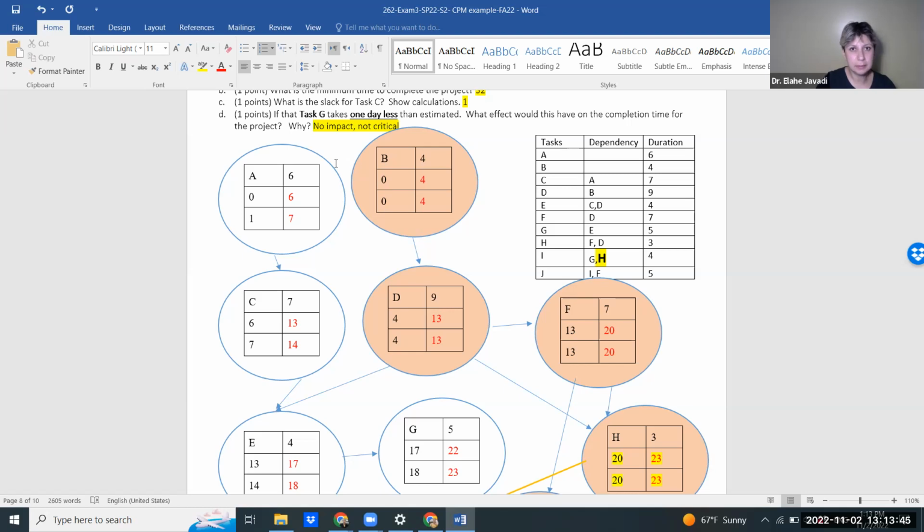We do a paper and pencil version here. Eventually, you're going to have a software tool showing you the critical path. If you're a product owner, and the sponsors want you to deliver something faster, you can look at your critical path and say, oh, I can do this task faster if I throw some server power into it, or if I have some extra bandwidth on the network to test something. So you add resources, you expedite a critical task, and the whole project will be expedited.